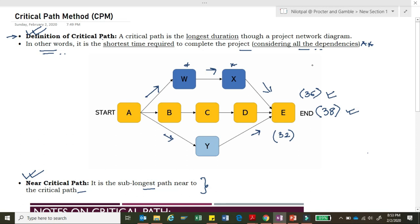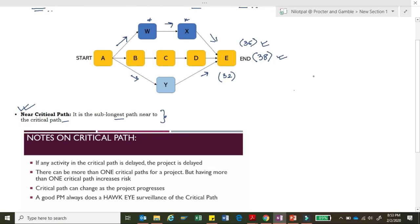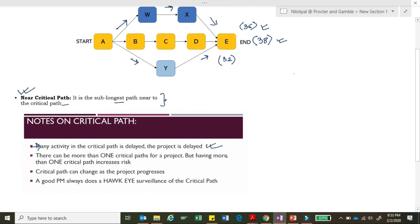Now let's move ahead and understand some more concepts of critical path. First: if any activity in the critical path is delayed, the project is delayed. Since the critical path is the longest duration path, any delay there directly delays the project. Second: there can be more than one critical path for a project, but having more than one critical path increases the risk of the project.